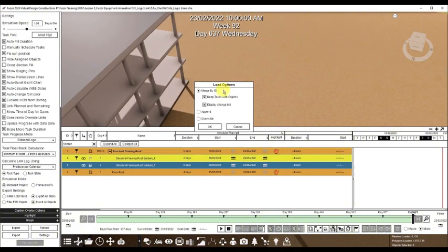Select Merge by ID for load options. This means that tasks are updated with a common ID to the tasks that you're importing. The Keep Tasks with Objects checkbox toggles whether tasks with objects assigned are preserved when making an update with Merge by ID. The Display Change List checkbox controls whether only the tasks with changes are displayed, specifically if the Show Changed microtasks is toggled or not.